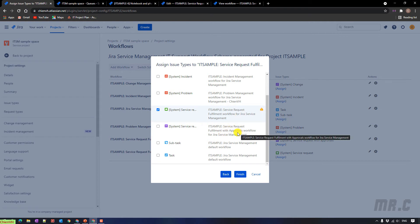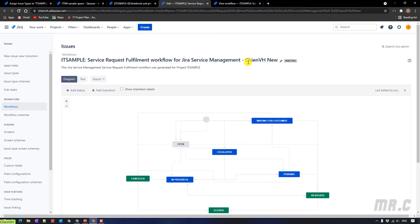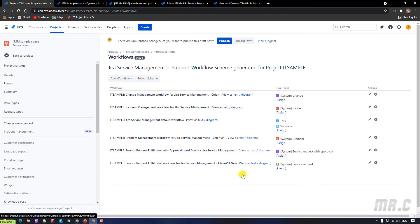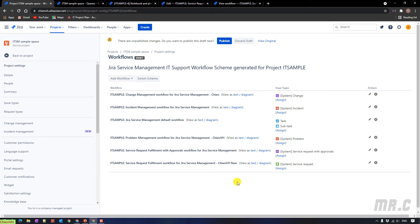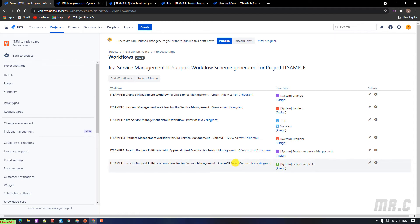That means for now the new workflow — GNVS new — is in inactive mode because we still have not assigned it to any issue type in any project. Back to the assigning screen, click on the finish button. In order to use the new workflow for the service request, it already assigns the new workflow with the hyphen GNVS new. Click on the publish button.